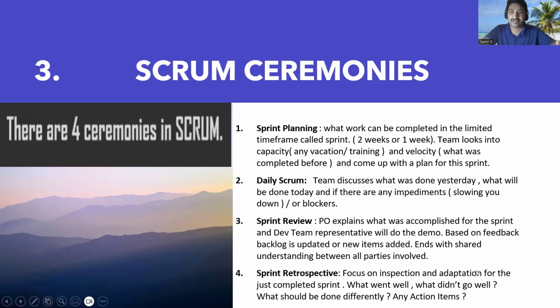What does that mean? We are inspecting ourselves. Did we do anything wrong? What went well? What didn't go well? Should we improve? What should be done differently? What should we continue to do the same? Because if something really produces good results, we have to continue to repeat that. What didn't go well? All this has to be discussed in the sprint retrospective,